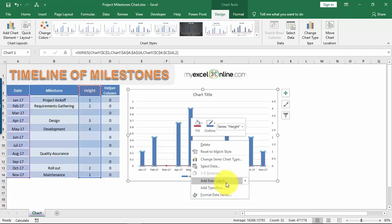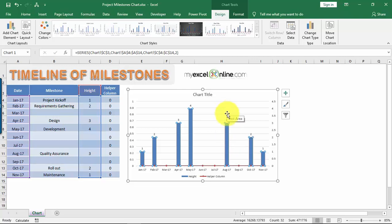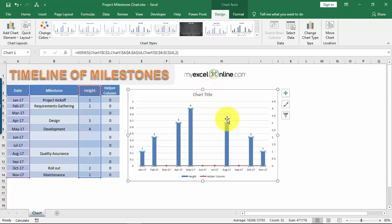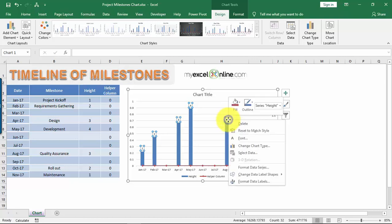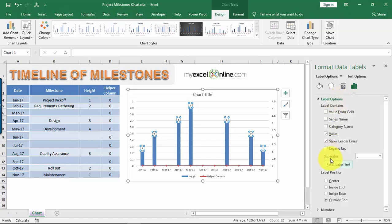Now select the blue column chart, right-click, and choose Add Data Labels. You'll see the height numbers — 1, 2, 3, 4, 3, 2, 1 — showing up. That's not what we want; we want the milestone names to appear. So right-click any of the height numbers, select Format Data Labels, and under Label Options make sure only Value from Cells is selected.